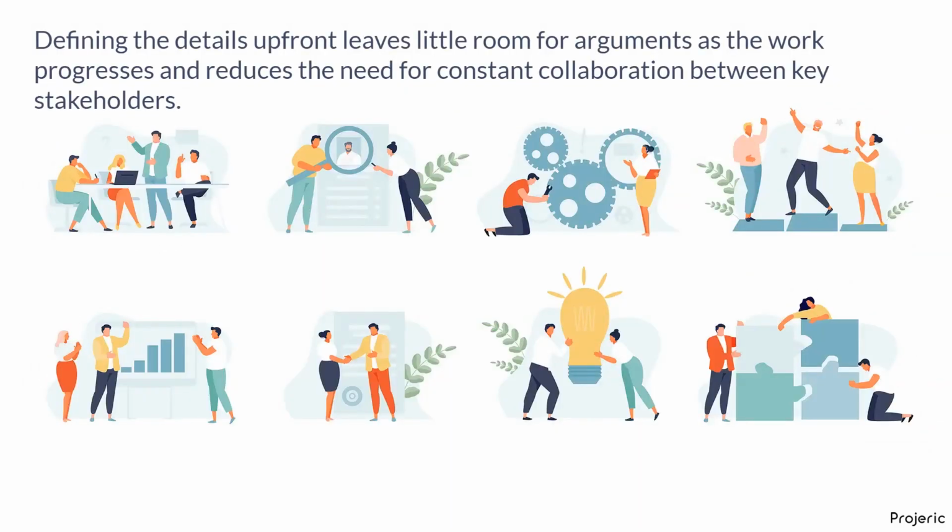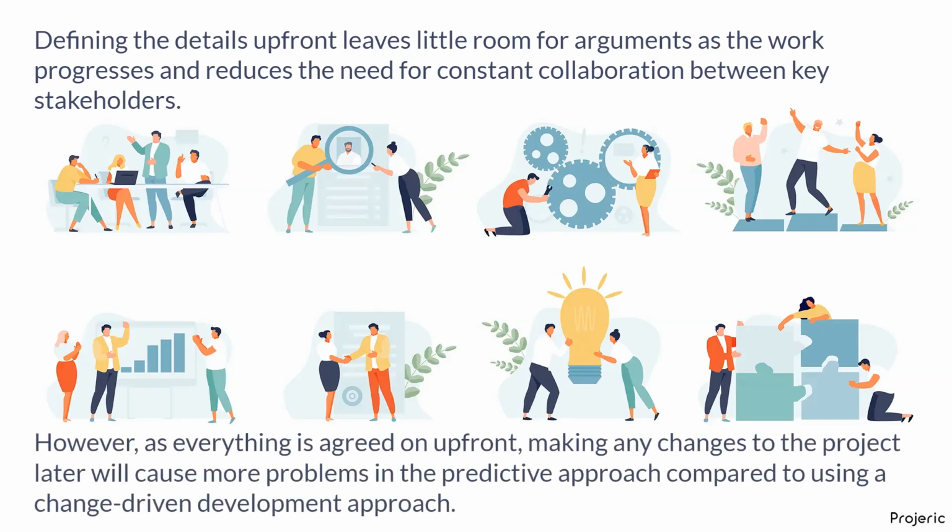Defining the details up front leaves little room for arguments as the work progresses and reduces the need for constant collaboration between key stakeholders. However, as everything is agreed on up front, making any changes to the project later will cause more problems in the predictive approach compared to using a change-driven development approach.